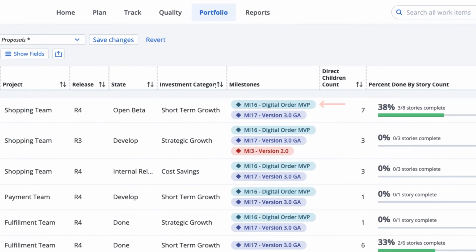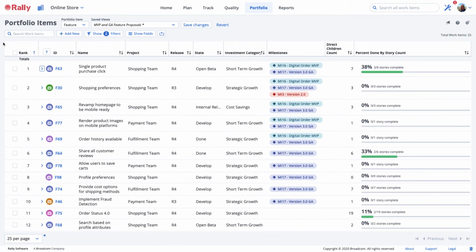Here, I'll associate the work needed for this MVP release, and then associate the work needed for the GA release. You can see there is some overlap when you consider fundamental work that needs to get done in either case. The feedback we receive from the MVP release will help us know which additional functionality or changes we may want to offer in the GA release. As a small group of customers use our MVP releases, we can tag features with the GA milestone as they become more loved and refined.